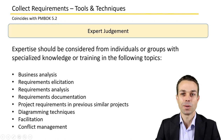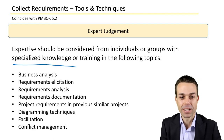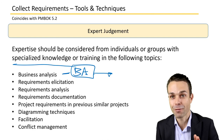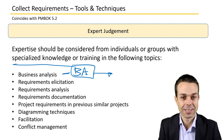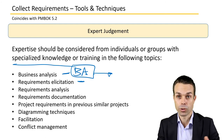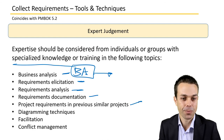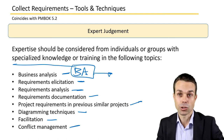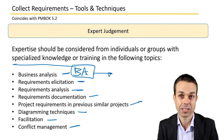Tools and techniques include expert judgment from individuals or groups with specialized knowledge in: business analysis — business analysts are a very prominent role in projects today — requirements elicitation, requirements analysis, requirements documentation, project requirements from previous similar projects, diagramming techniques, and facilitation and conflict management, where special people can help bring certain groups together if they don't get along, which can happen with competing priorities across organizations.